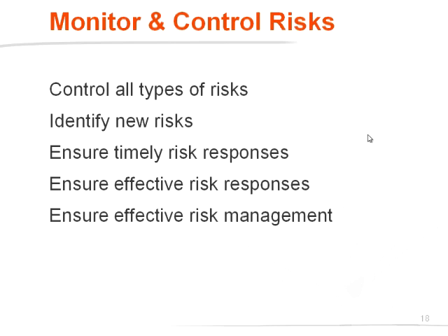Right. Also, the last one that you have here is ensure effective risk management. I suppose that is overall, right? And I assume the same rule goes for this as well. You have to be able to measure whether your risk management on the project overall is effective, right? Yes, put your metrics in your risk management plan so that you measure the same way in all projects and so that you can compare them. And basically, you need to measure on all layers.